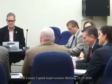So our guys will be continuing to look at that. We'll get the drawings, I think, this Friday the 18th will be the official 50% DD set. And then we'll look to see where we are with those. And the evaluation of different options, finishes, materials, and so forth, in the walls, ceilings, floors, and so forth, in the courtrooms, corridors, lobby. And then looking at just pretty much everything that we've got in the DD. And then that is all leading up to the DD issue of the 100% DD documents on February 3rd. So then we'll, in earnest, do another total re-estimate of the project at that time. In the meanwhile, we'll look at different systems, inside and outside, exterior, interior, and so the cost analysis will continue all the way through DD.